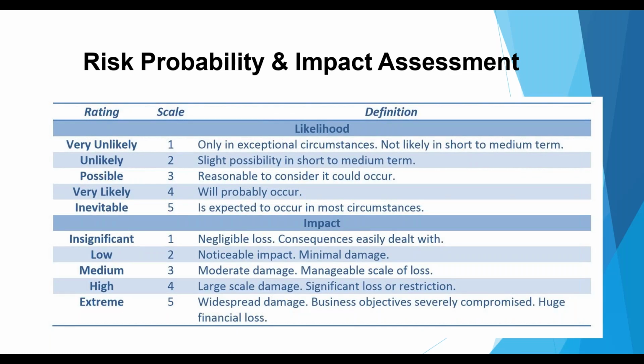In order to start the probability and impact assessment, you need to define the rating scales and the definitions, like for the probability and the impact. As you can see in this slide, there's a table of a rating and a scale with the definitions of likelihood, like very unlikely, unlikely, possible, likely, or very likely. So these are some of the important aspects of the definition.